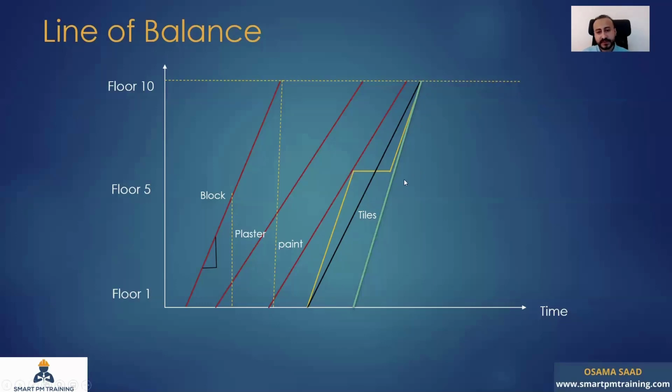Another scenario, if you really have 10 masons on site and you wanna take full advantage of them, you don't want to sacrifice any masons, you wanna go full power. Okay, so first, you have to keep maybe 2 weeks after the completion of paint at the last floor. So this is my completion of all tiles in the project. And you have 10 masons. So 10 masons per floor. You have your productivity rates given to you right now. So 10 masons, you want to see how long 10 masons will take to complete the floor, right?